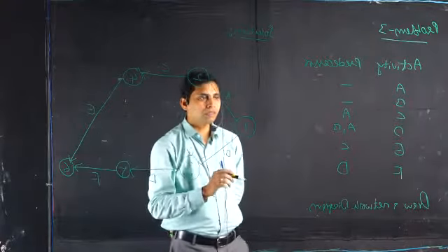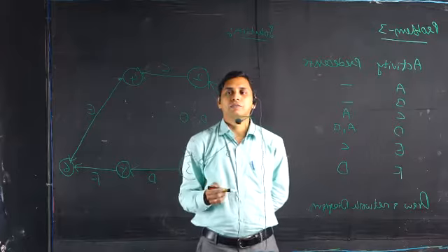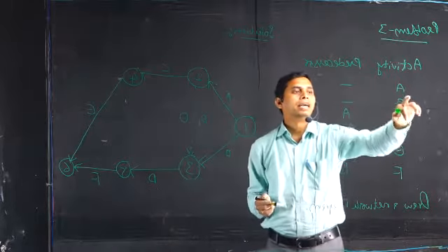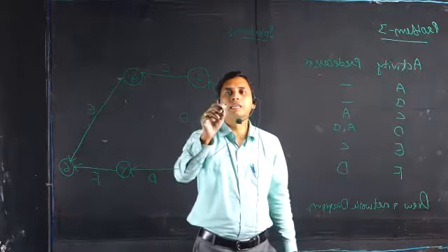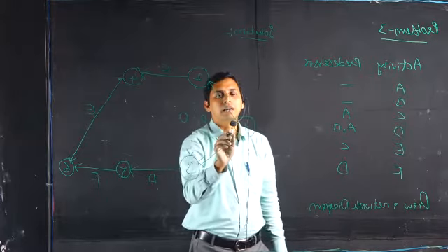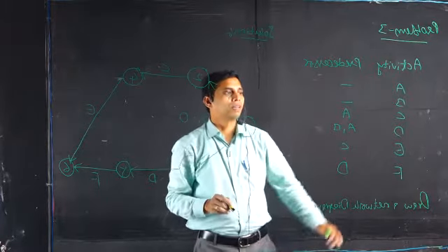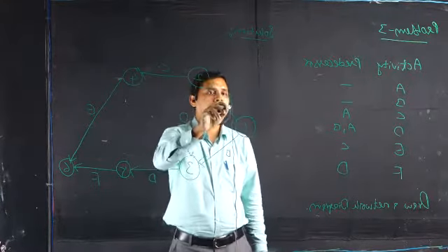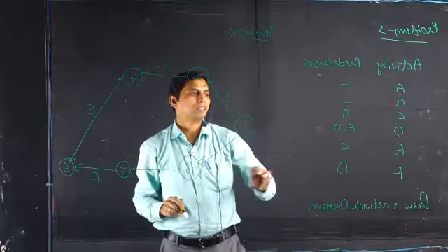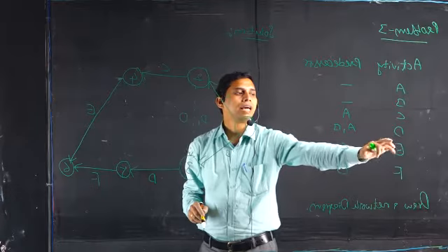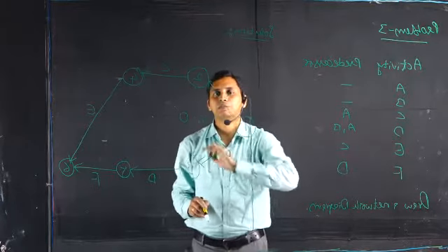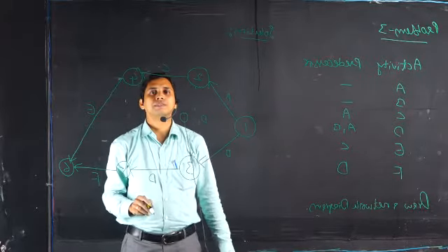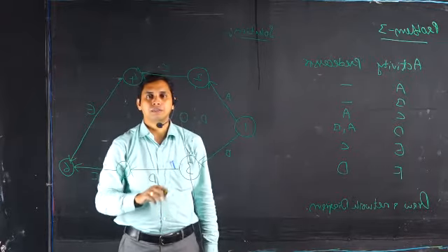Now let us recollect once again what has happened in this problem. For activities A and B there is no predecessor. Look here, A and B are drawn as the initiating activities. And for C, A is the predecessor, so we simply drew activity C after A. But for writing activity D, the A and B combination has become the predecessor. Since A and B are the initiating activities, they must be joined with the help of a dummy activity, not with anything else.